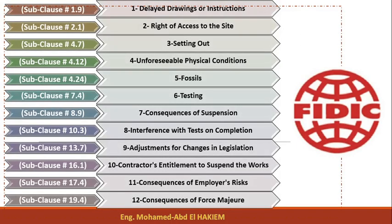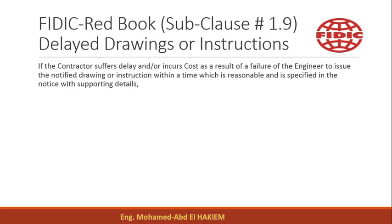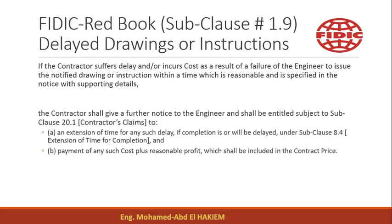Case classified as an Excusable and Compensable Delay: Cause 1 – Delayed Drawings or Instructions. If the contractor suffers delay and/or incurs cost as a result of a failure of the engineer to issue the notified drawing or instruction within a time which is reasonable and is specified in the notice with supporting details, the contractor shall give a further notice to the engineer.